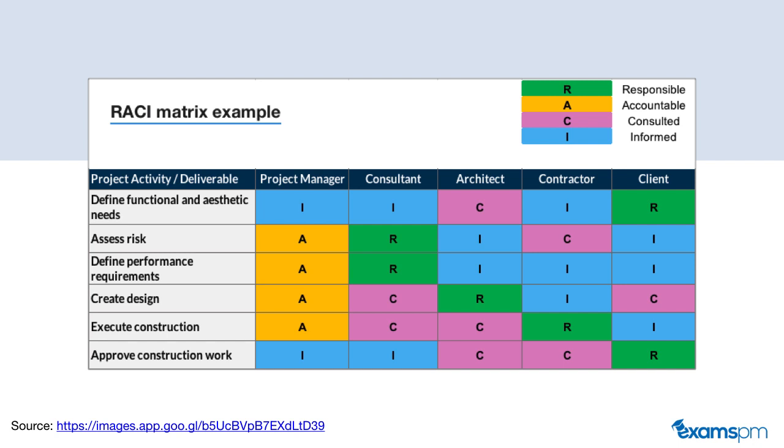So you probably are wondering now, what does RACI stand for? Well, RACI stands for responsible, accountable, consult, and inform, and the intersection of the row of the project versus the activity task will show you what that person is responsible for within that project. In other words, it identifies the roles and responsibility of the individual in that task or project. So just by glancing at this chart, you can figure out who is doing what on the project.